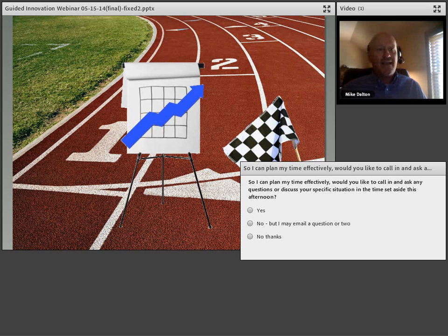If you noticed on the one chart where I showed the staggering between projects, those projects actually overlapped each other a little bit, which is kind of normal. What you don't want to have happen, though, is a team where I have my R&D resources bringing two projects to the market at the same time. If I'm in one phase on one project and in another phase on the other project, that's usually more manageable.